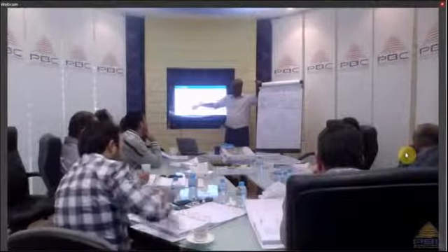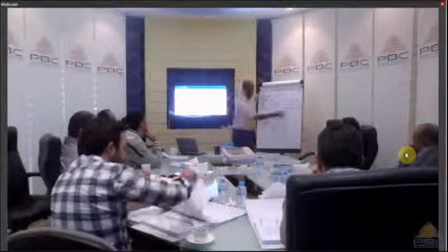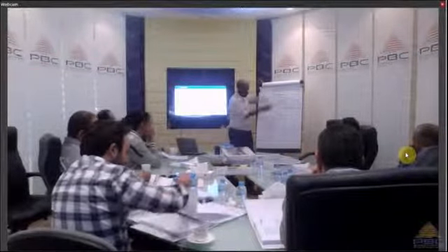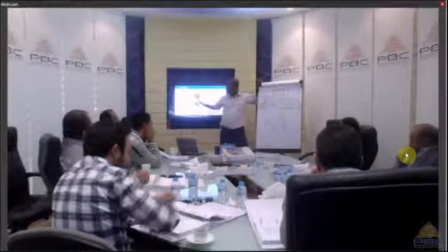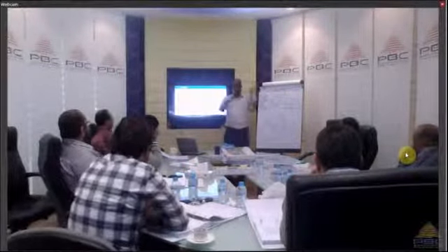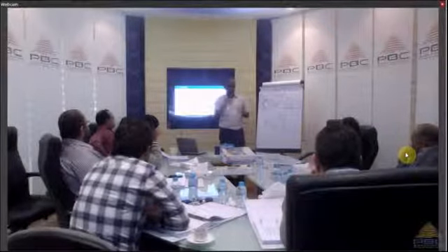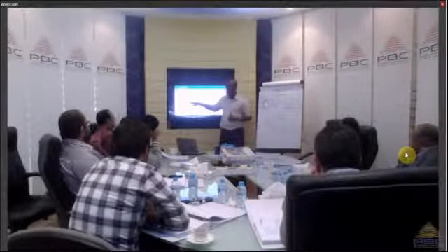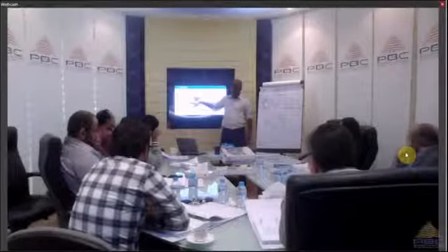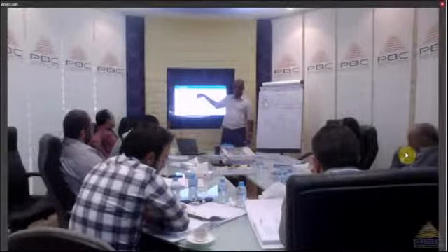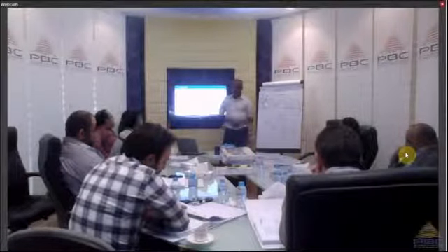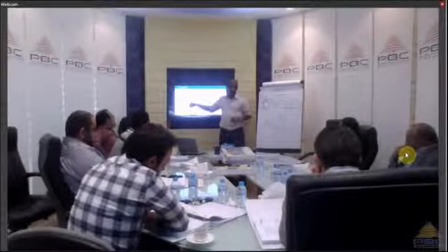And you can also pick and mix. In the same WBS, you can have part of it by phases, part of it by major deliverables, so you can combine. But in general, in construction and IT, we use phases. In projects like building aircraft, cars and ships, we use major deliverables. You guys use phases, I think. Okay.